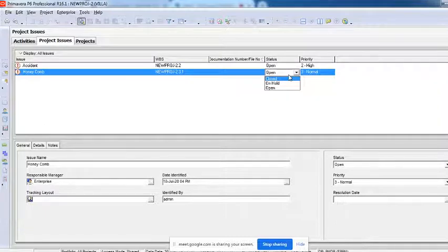Or the issue has been identified, but the impact of this is unknown, or whether we really want to resolve it, or whether this issue will affect our project, is unknown. So we just want to hold that issue, because what to do with it and how to resolve it is still unknown. At that time we do not keep it as open, because you have to take some decision on it. Because the moment you or a client generate a report,